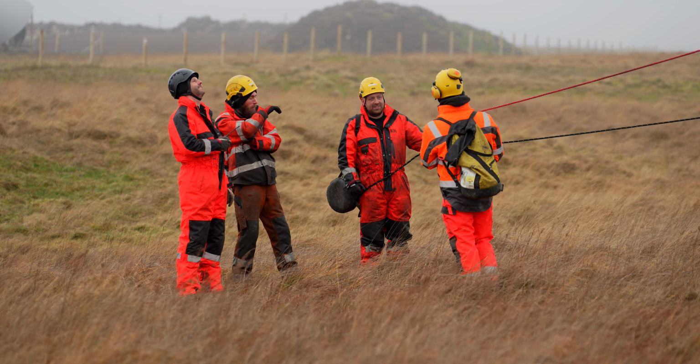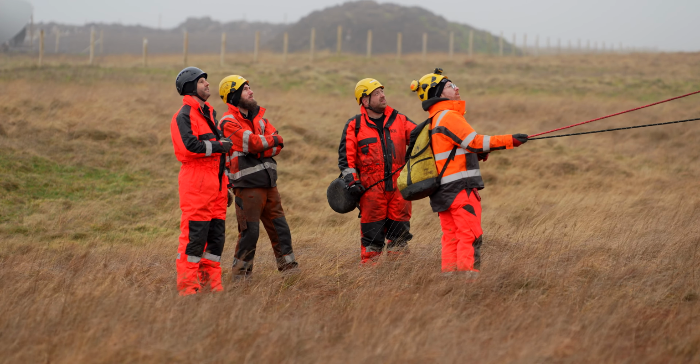Due to the wind picking up this afternoon, we're going to be winded off today and tomorrow, so we'll return on Thursday. We had a forecast today of 3 to 5 metres a second, and we're now at 13 to 14 metres a second. And then when the wind speeds are more acceptable, we'll be mounting it onto the front of the nacelle.